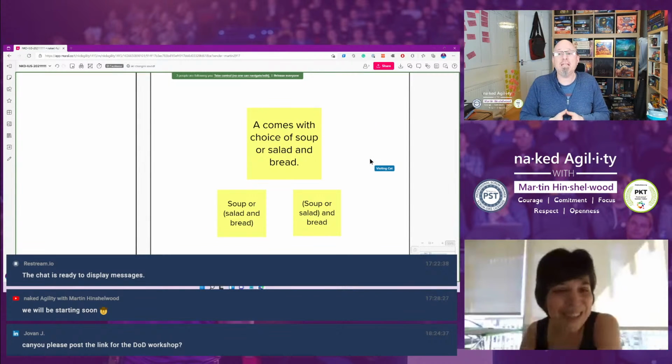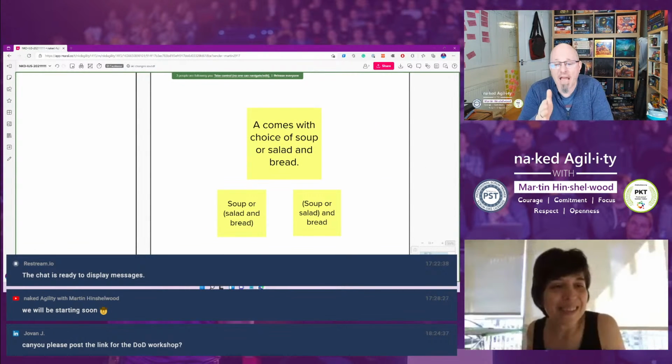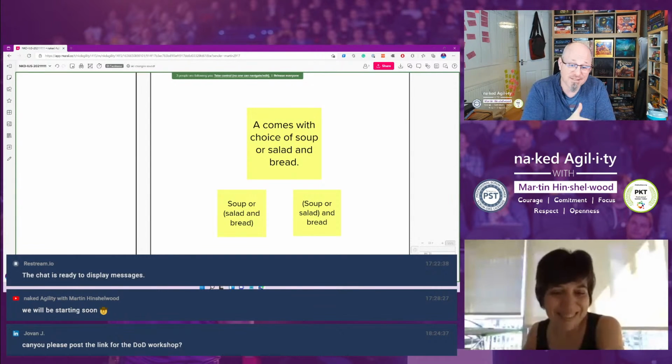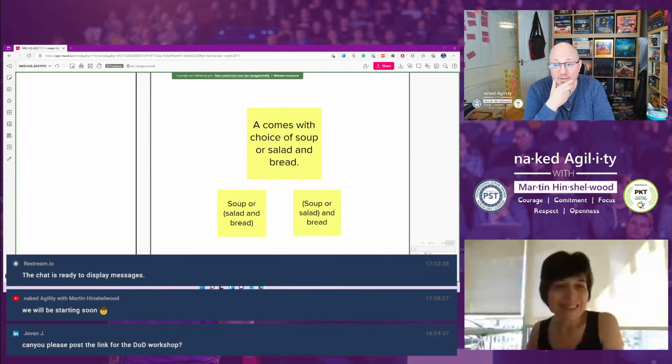Well, that's definitely one of those things that the business very rarely asks about until they get it and performance sucks. And by that time, it can often be too late to fix some of the performance issues because they're endemic to the way the product's been architected, and it's a big deal to change it.